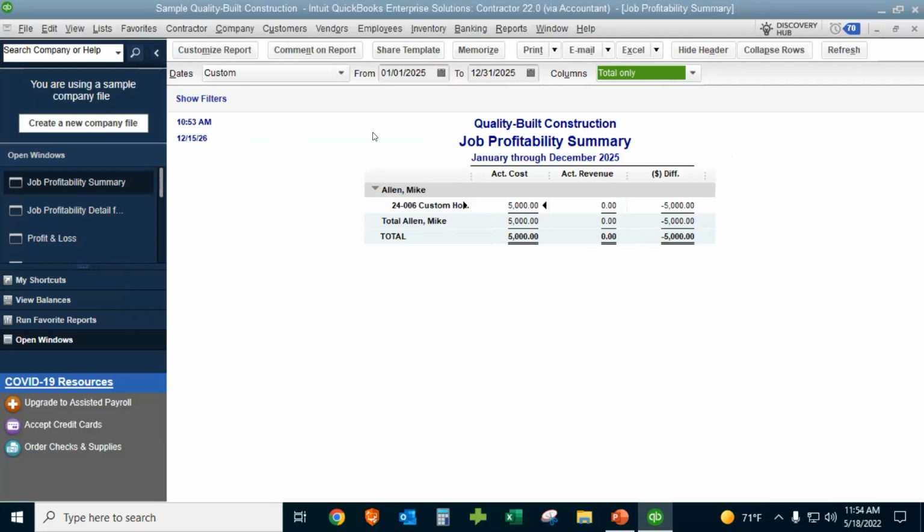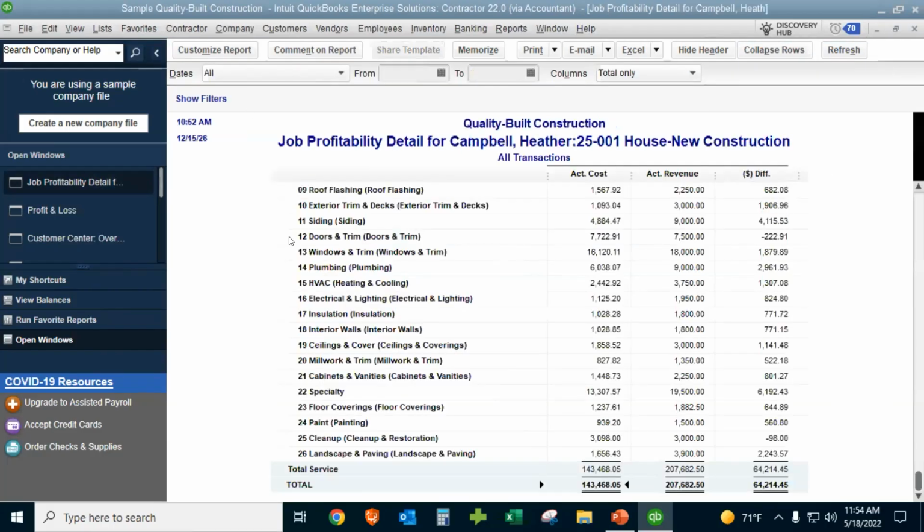We generally see that with our home builders, where they have closings for each job. They'll code all of their costs to construction in progress, and all of their deposits to either customer deposits or a loan if they're carrying the loan. Then when they actually close on the house, they'll record the closing statement and move everything to the profit and loss at that point in time.